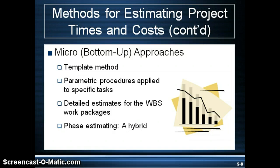Phase estimating is used when there is uncertainty around the final product. In this case, a macro or top-down estimate is done to justify the project and understand funding needs. The estimates are done in phases so that as the project details become more certain, they can complete the estimate for each phase.